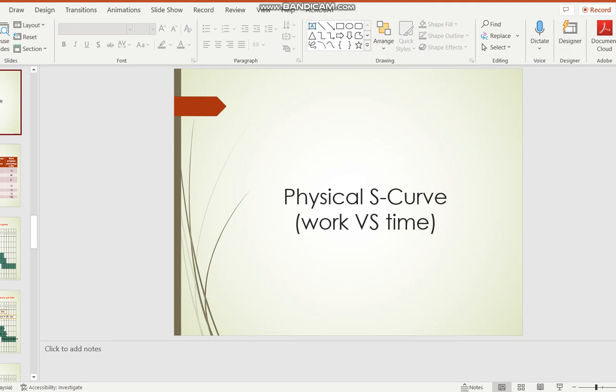I told you this very strongly that day: if you look at that physical 33%, or you put that as 50% on your Gantt chart, you need to associate that progress with some physical work, like some completion or a milestone, something very clear for you to mark that this is 50%, this is 33%.